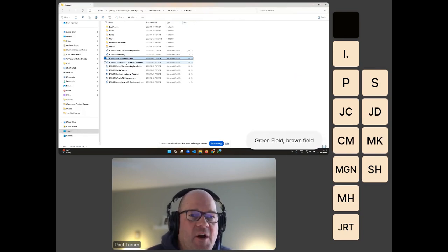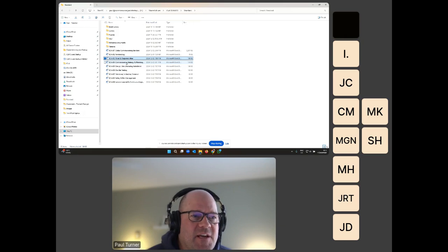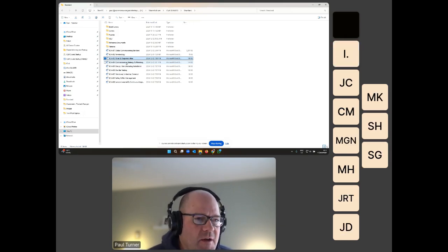Then the second document to define your commissioning strategy, prepared a little bit later once a lot more of the design details are available on the project, is your commissioning execution plan. So this is the second document that defines the next level of details in your commissioning strategy that really gets into how you're going to perform your commissioning on your project.